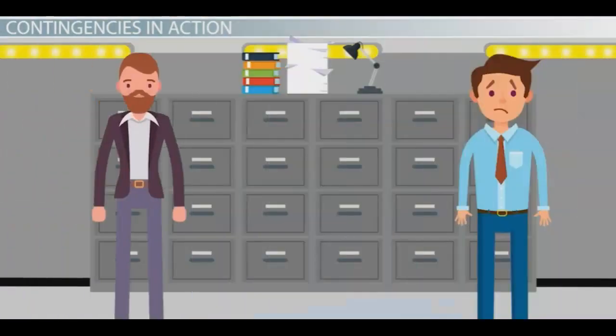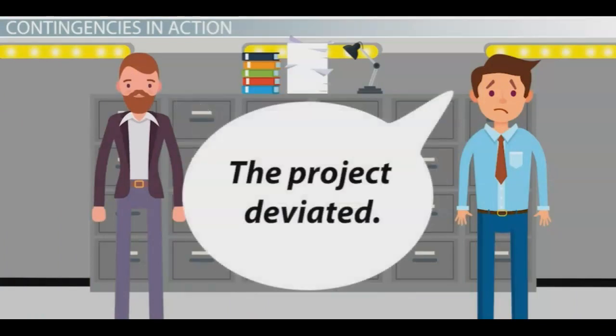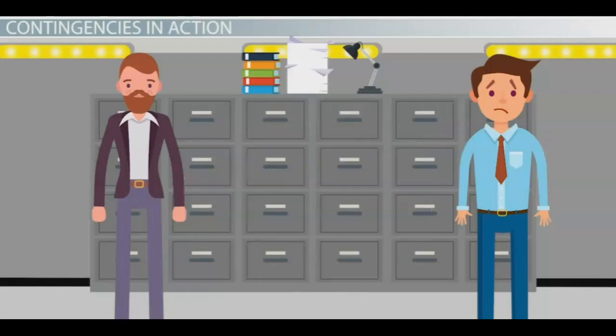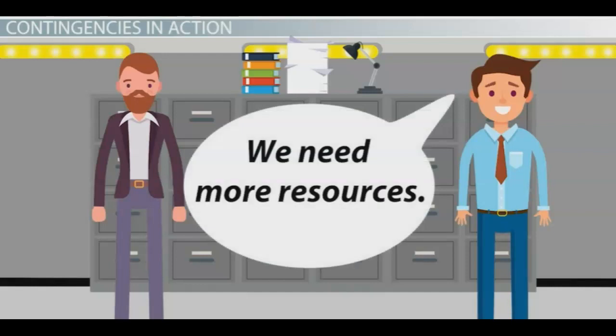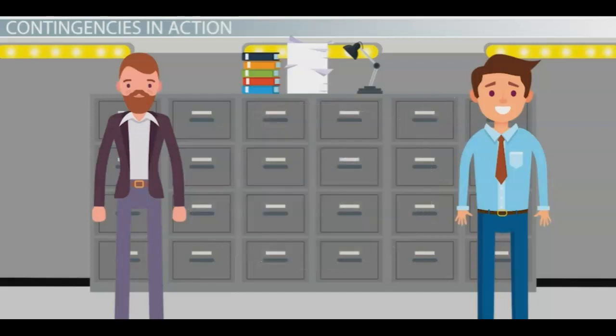If a contingency is utilized, determining the cause is critical. By nature, tapping into the contingency means that the project deviated significantly from its intended course. Determining the reason for the contingency helps a project manager provide a better and more accurate project plan. In the case study, if the physician's office required the use of additional resources to meet the conversion deadline, the project manager can use the information to create a project plan with a decreased chance of overrun.